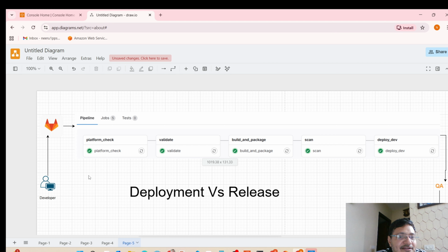A sprint is like a small project that you have been given to work on, and within that project we create a ticket in a tool like Jira. Jira is the most common tool that we use to document all the tasks or activities that we are doing for a particular project, or sprint cycle. In general, a sprint is 2 or 3 weeks.